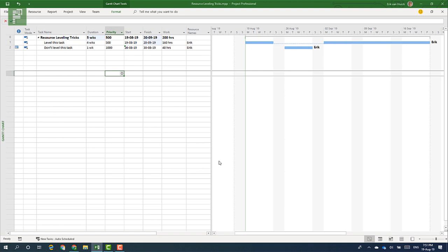separate entities. Now some work can be split, some work can't be split, but what we see here is that the lag time or the duration of the project is considerably less than it was when I deselected that split. So you might want to consider this option if you have packages that can be left alone for a bit of time and a person can jump onto that task afterwards.